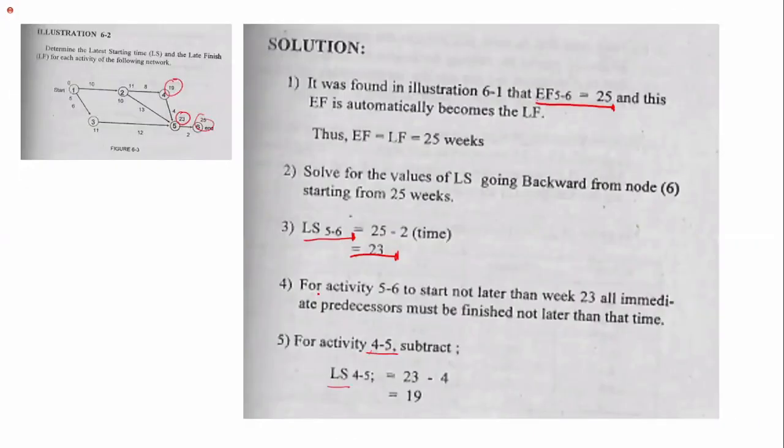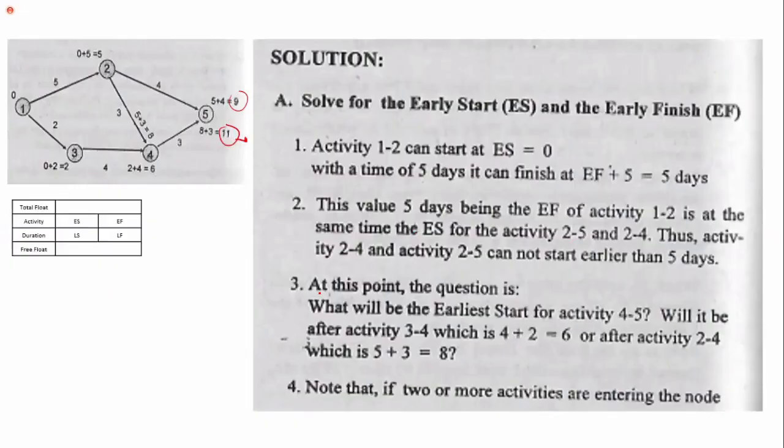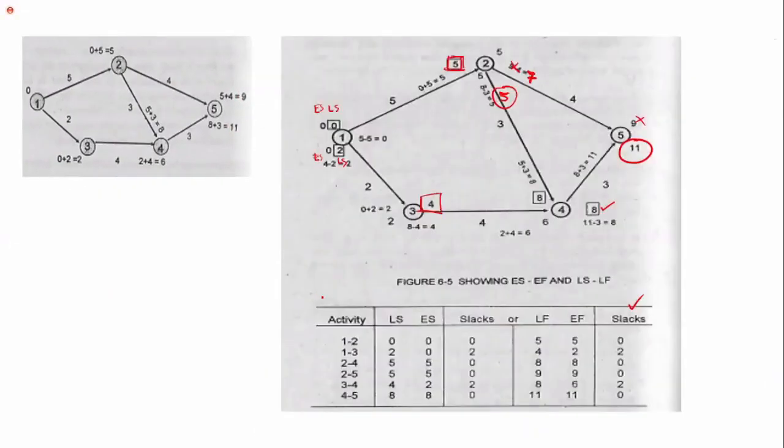For the float, it is early start minus late start, or rather late start minus early start, or late finish minus early finish.